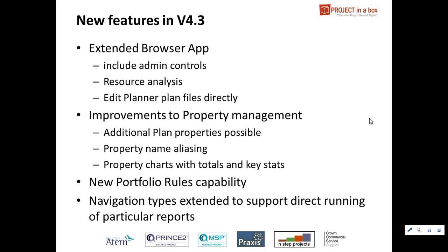We've also added resource analysis. You were able to use standard views and user data ranges, etc. on tasks and risks and issues before, but not to get your resource analysis. Well, you can do that now. You can run resource analysis, depending on your permissions, of course, always for yourself, so each individual can go and see their own resource allocations, demand level allocations, etc. But you can also, depending on your permissions, go and see them for groups of other people across the project, the portfolio, selected groups of individuals, etc.